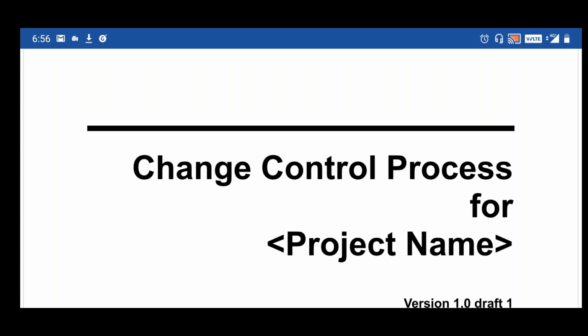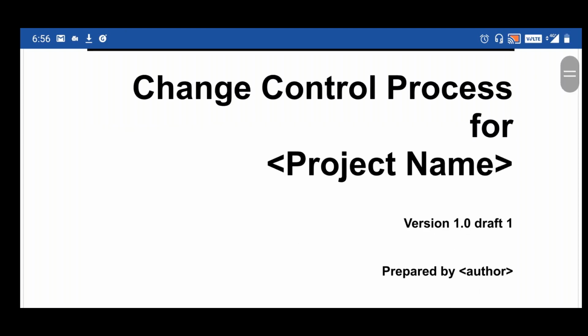If you are following agile methodology, we will not call it a change request. Any change will go as part of a new release or iteration cycle as a normal requirement.